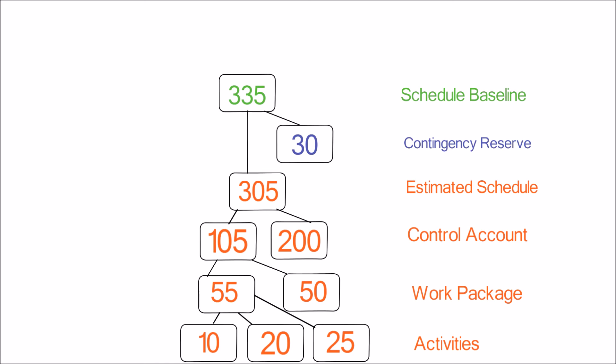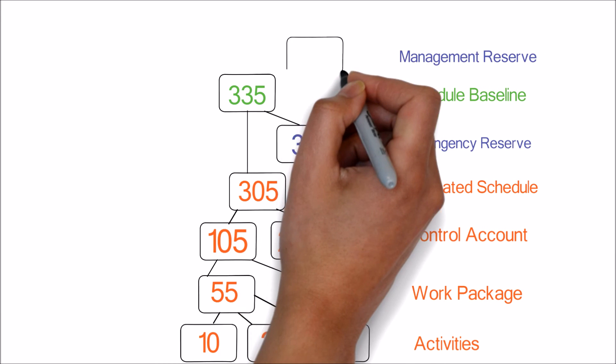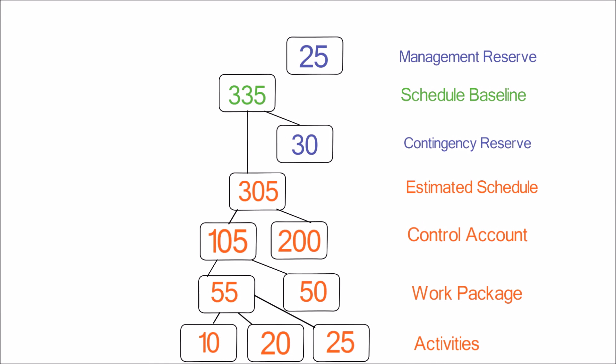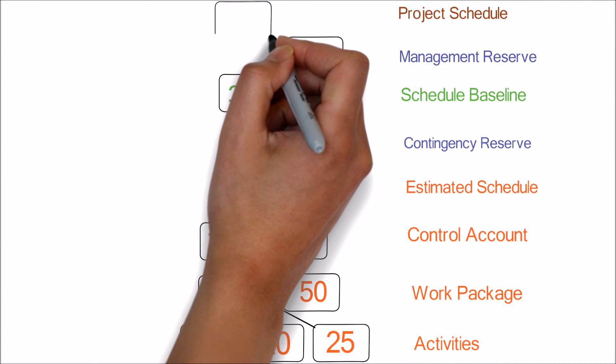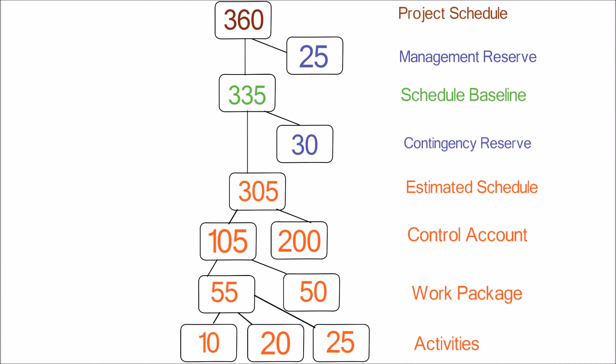Now we will factor for unknown unknowns and add management reserve of 25 days. Summing up all this will give us the project schedule which is 360 days in this case.